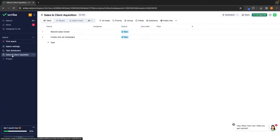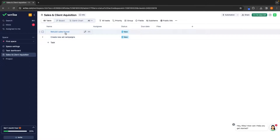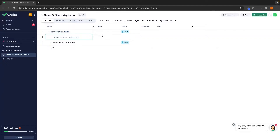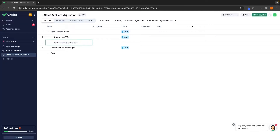My team can now come into Sales and Client Acquisition and see exactly what I want to do. However, 'Rebuild Sales Funnel' is extremely broad and doesn't really give my team much detail. So what I can do is go to the more section and click on 'Add Sub Item' to give them even more information. Under Rebuild Sales Funnel, I can now plan out different steps — for example, the first step might be to 'Create a New Video Sales Letter.' I can then click enter and that is now a task within Rebuild Sales Funnel.